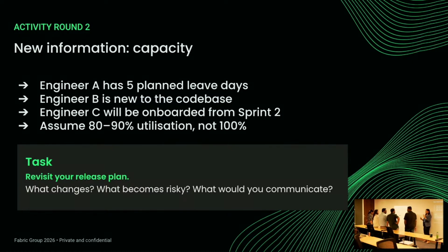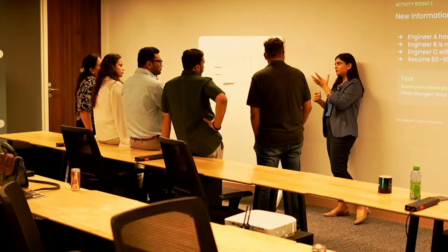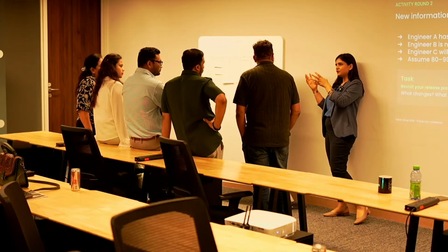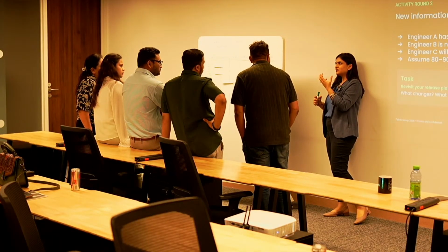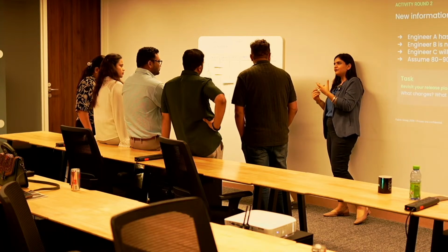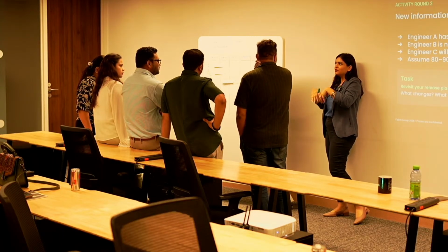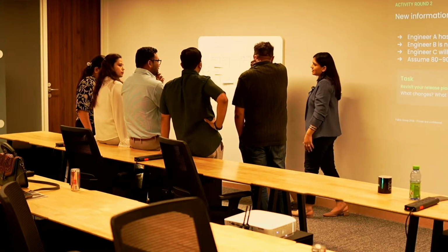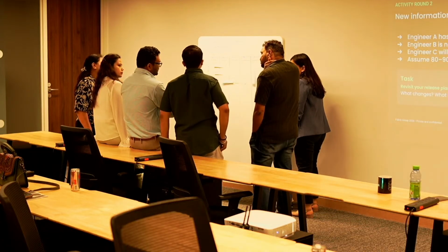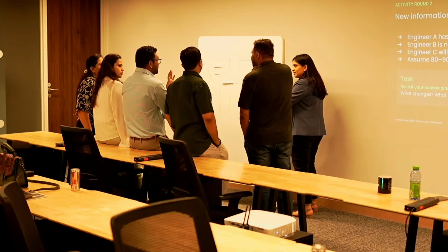I think based on what you know about the team and the scope, you make those assumptions. It's typically between 80 to 90. Some people take it 70 to 90 because it's also about the uncertainty. If you don't understand the scope, you'll bake in more buffer. But that is a different buffer that you add. This is just the utilization factor, purely without the buffer part of it.